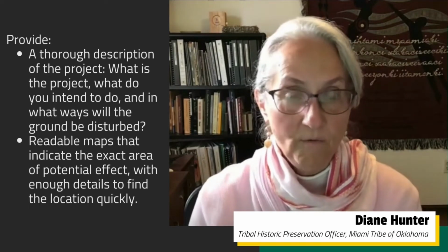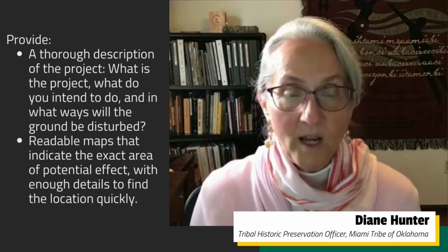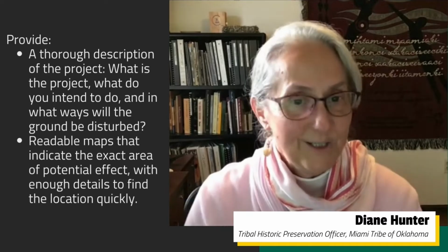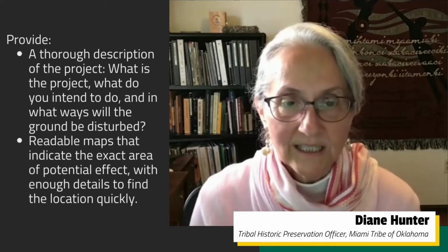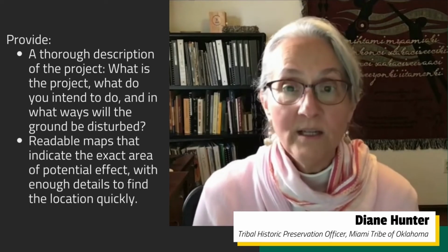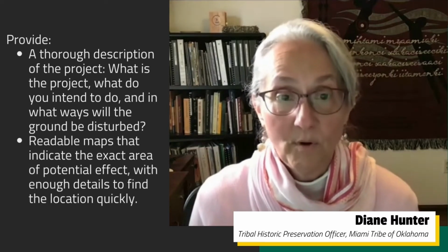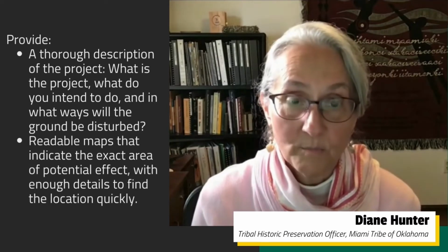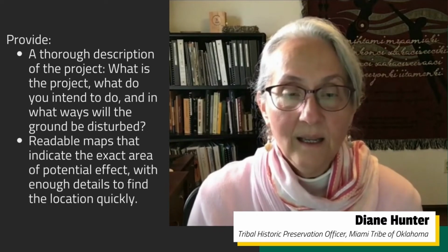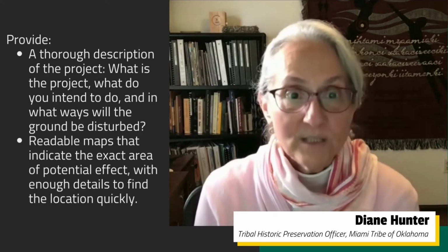Some agencies are very good at providing a description of the project, and I don't need all the engineering details, but I need to know what the project is and what they intend to do with it, and in what way is it going to disturb the ground, because that's generally the primary concern, is ground disturbance. I need maps that I can read and figure out where this project is.